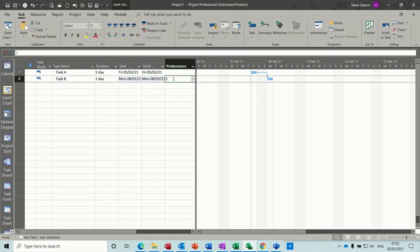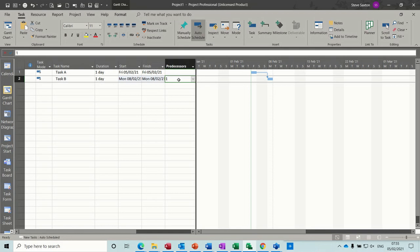Now lead time and lag time, if you're using the default task type, which is follow on, one task finishes and the next task starts, you have to qualify it with the FS prefix. Now, how do I know it's FS? If I double-click onto task B,